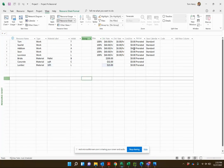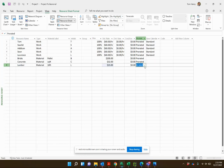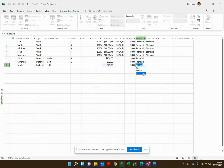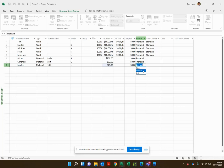A couple of other options here. You can decide whether you want to prorate that. Are you going to pay your invoices at the end of the project or at the end of the particular task, at the start? Would you want to prorate it if you're building the wall over the period of two weeks? As you get to the second week you would have accrued one week of cost.